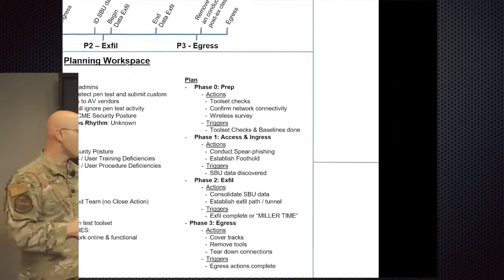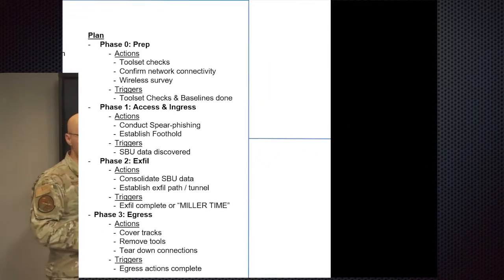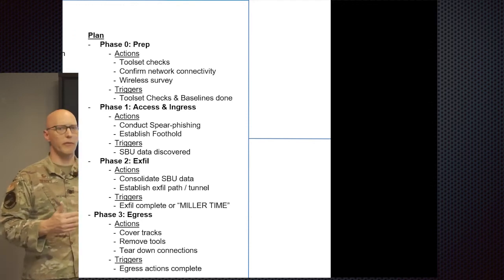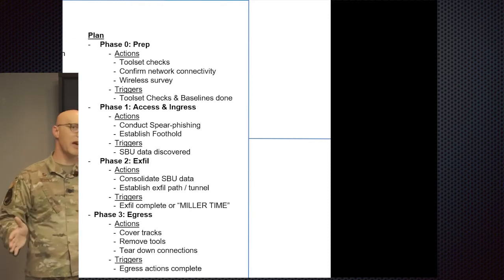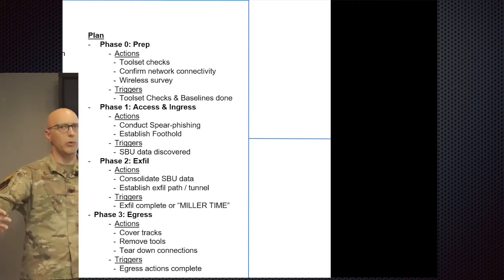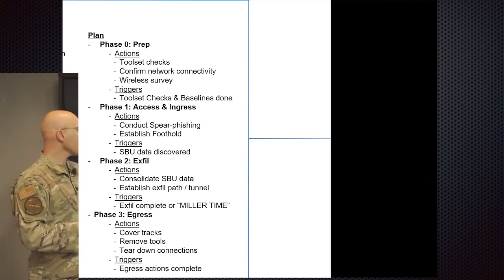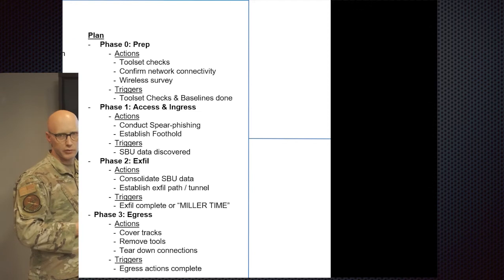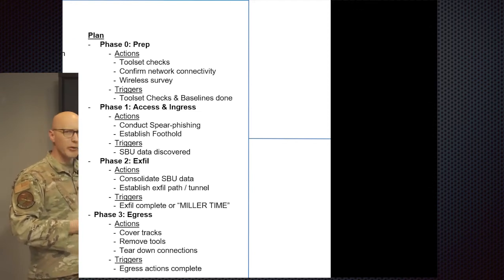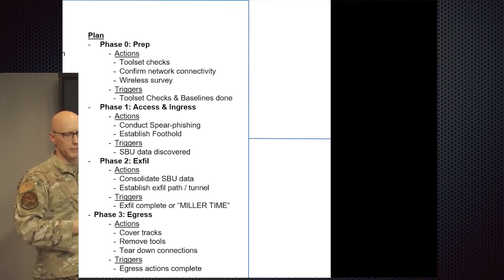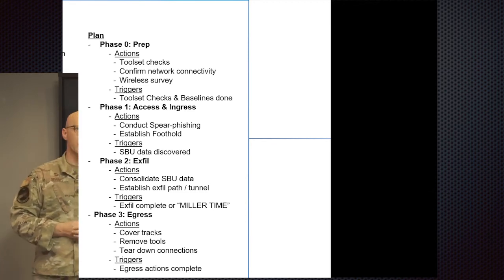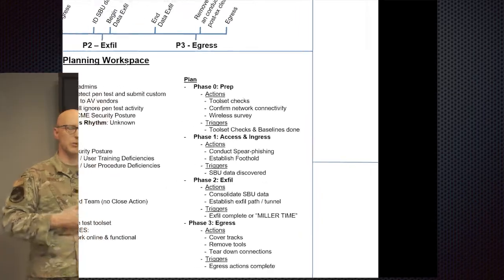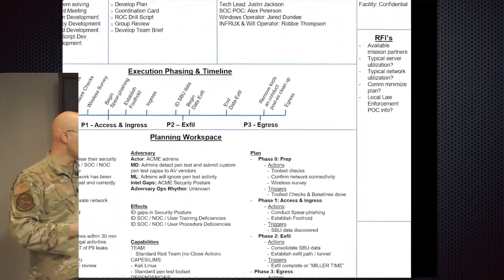We're also going to talk about the plan. As we walk through the schema maneuver, we're going to talk about what the triggers are to move from one phase to the next. Triggers are often event-based or time-based. At this time, we will do X. At this next time hack, we will do X. For instance, a good example would be we're going to start at 1200 hours or whatever that execution timeline looks like. But other events might be event-based. One event-based trigger might include something along the lines of, once we get our first call back, we will do X. That would be an event-based trigger.